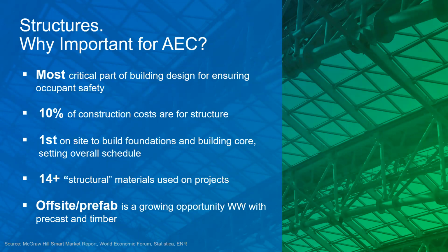By cost, we know it constitutes approximately 10% of the cost of the construction. And it's what is done on site first, because the first thing which will happen on site when building a residential building, commercial building or hospital is to do your technical investigation and put up the foundation which is going to support that building. So the structural part forms the first component of the building which will be put in place on site.